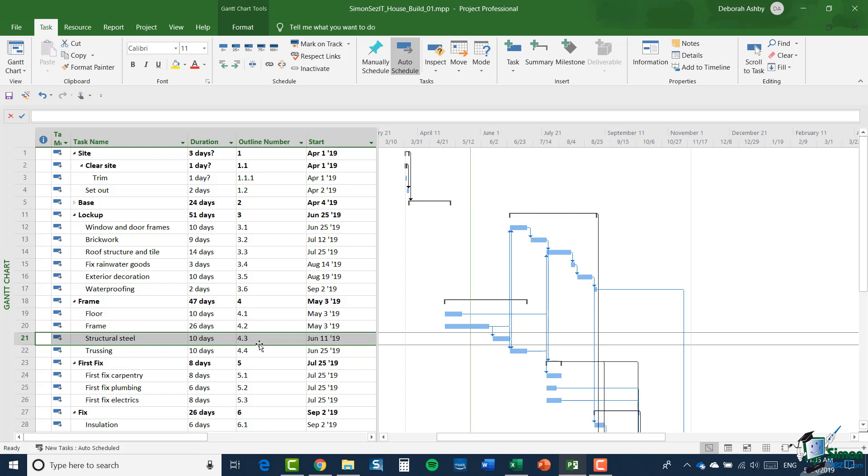So it's a way of not only identifying tasks in the project but also adding some structure to that identification. Now on the face of it that sounds like a pretty good idea, but in practice the use of these outline numbers is a little bit fraught with problems. If you have a very fixed structure in your project and possibly you're reusing the same structure over and over again and there is rarely if ever a need to vary that structure, then this approach can work. But if in fact what you need to do is have something that can deal with variations with the addition of new tasks, then it doesn't.